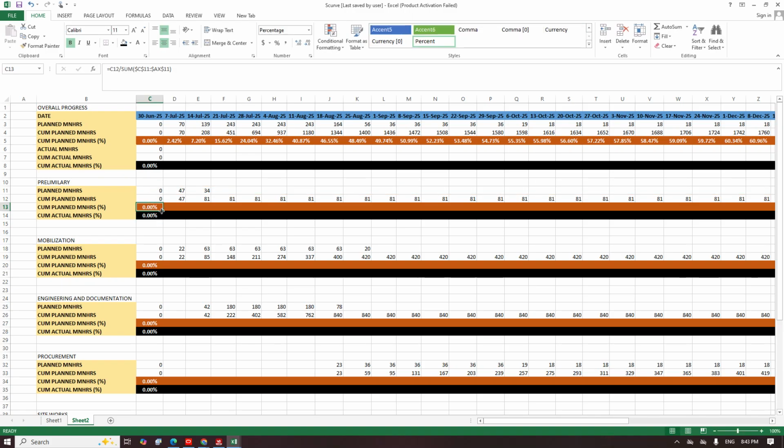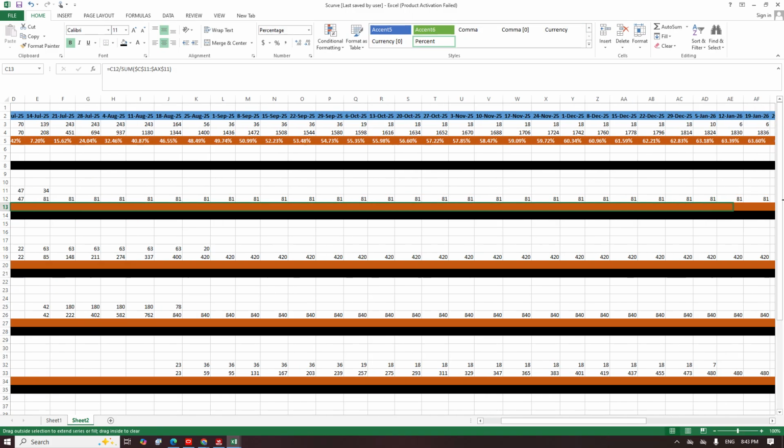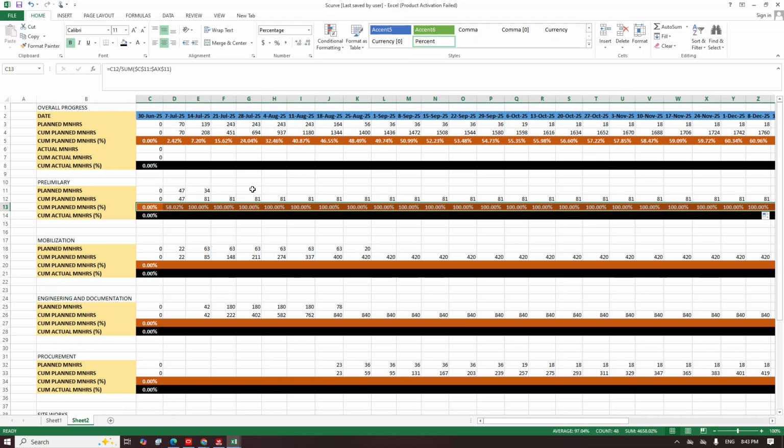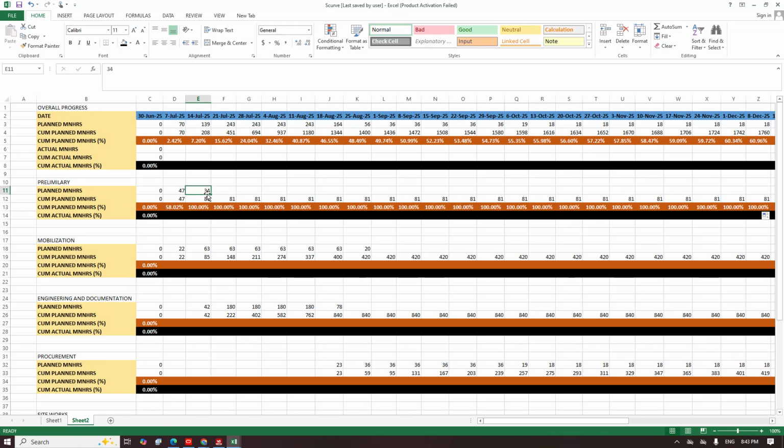I will come back here and drag this to the end. So automatically, I'm done with this one. I will pray for it to give me 100%. 100%, I'm done. But in reporting, this project stops here. Look at where it stops: here, it has given you 100%. After 2 weeks, you have got 100% here. So the preliminary is just a 2 weeks activity. That's what it is telling you.